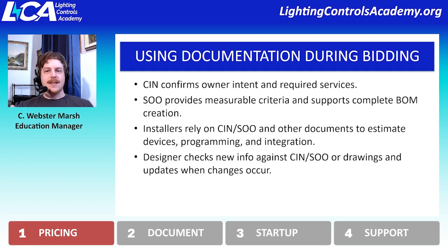Then the designer is going to be reviewing and revising their documentation, oftentimes in what's referred to as a bulletin, to make sure that if there's any changes throughout the bidding or construction process, that the documents actually reflect those changes so that the installers have the most up-to-date and accurate information to be able to build the project off of.